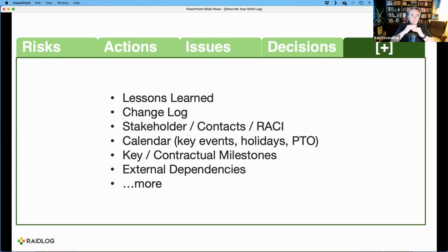And what I like about doing this as separate, discrete lessons learned is you can then make each one of those actionable. So a lesson learned is open. You can't close that lesson learned until something has happened. So somebody has updated a template, they've changed a process, they've done something to help you take action from that lesson learned, or indexed it in a way that you can refer to it later from another project.